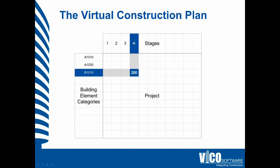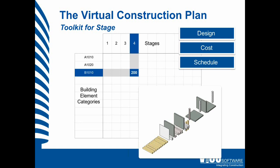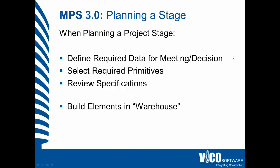So for stage 4, for the B1010 building element category, we want to be at level of detail 200, which will require a certain class of model, a certain class of estimate, and a certain class of schedule. We can then pick the primitives we would like to use and implement a kit of parts to reach that desired level of detail. We'll develop a toolkit for each of the stages, which includes design, cost, and schedule information.